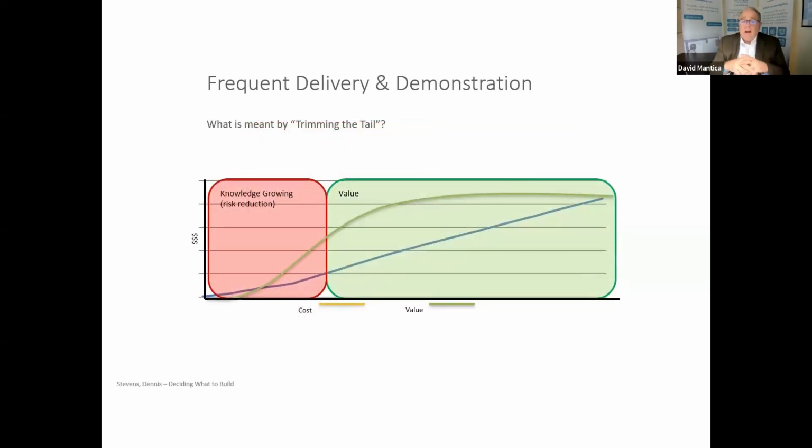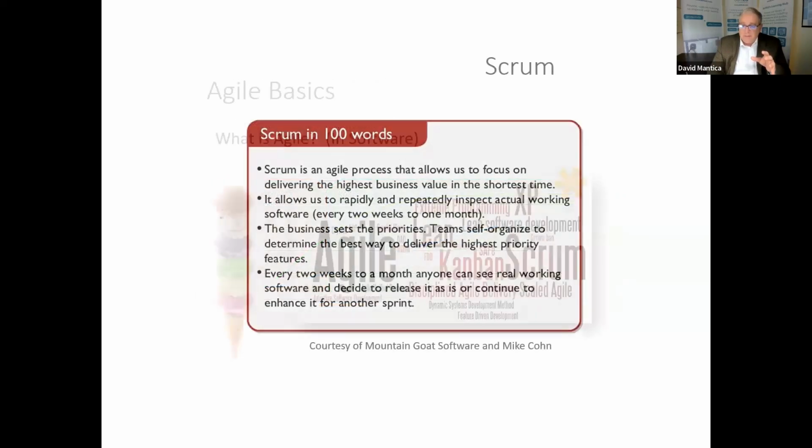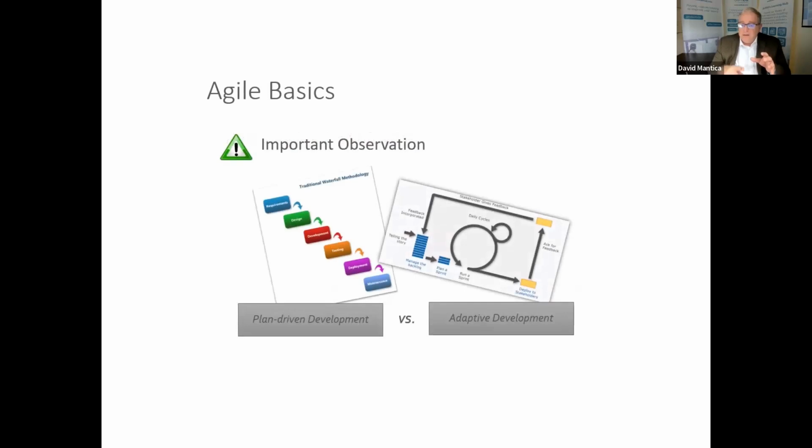So why are we doing Agile? And this concept of trimming the tail. When you go back to waterfall, go back a few slides here. Sorry if it's slow. You go on that left side. In order to block out the world during your production, your plan has to be tight and concise. Your plan has to include everything you can consider as a possibility during that blackout period. In most cases, the way waterfall is set up is there's a lot of risk mitigation. So there's a lot of extra work that ultimately isn't needed.